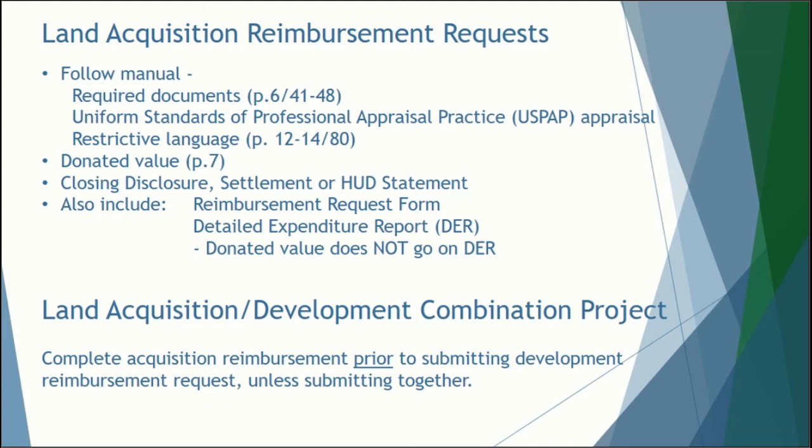Each property acquired with PARTF funds will be required to have a notice of restriction applied to the deed. The exact language your real estate attorney should use for this notice can be found on pages 12 through 14 in the grant manual. Donated value is explained on page 7 in the manual. We will cover it in more detail shortly.